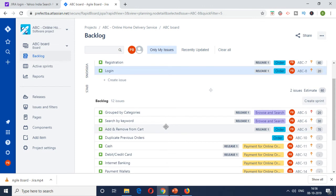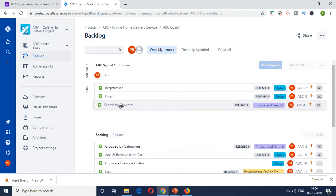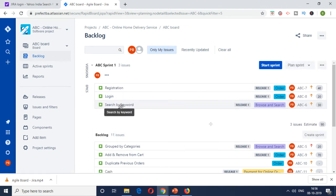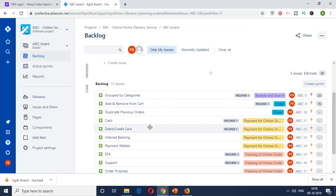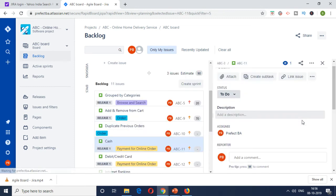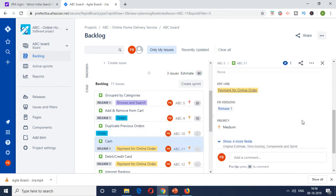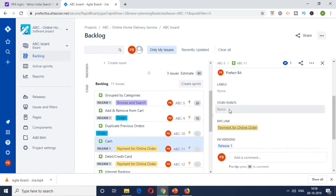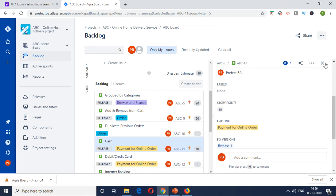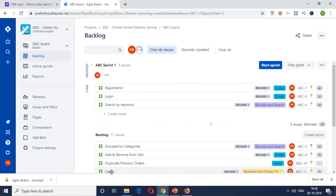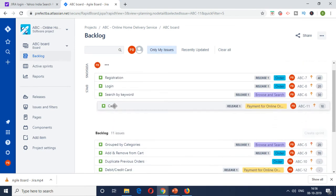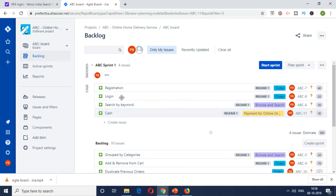Then we'll put in search by keyword. And then we have still 10 story points capacity. I'm just going to tag this for demonstration purposes. This feature of accepting cash is just 10 story points. So that is 10 story points. I'm going to move it here. So that gives us the sprint capacity of 100. So this is your product backlog and this is your sprint backlog. So this is how the sprint planning is done.